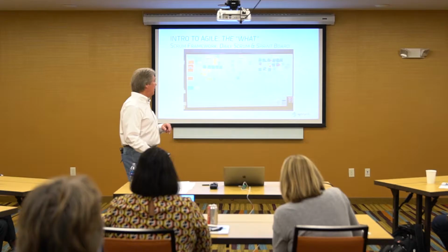This is basic queuing theory. I can share the math with you if you like. Reduce WIP. The more you increase WIP, the more you give somebody things to do, the more stuff you have in progress, the slower your throughput. I don't care if we're talking Agile or not. So when you have a guy divided 5 different ways from Sunday, they're just going to move slower. Plus they've probably got 5 people hounding them about it.